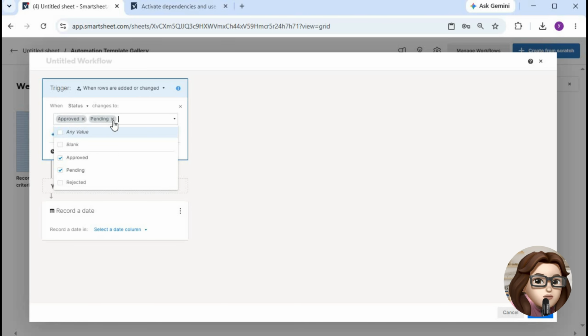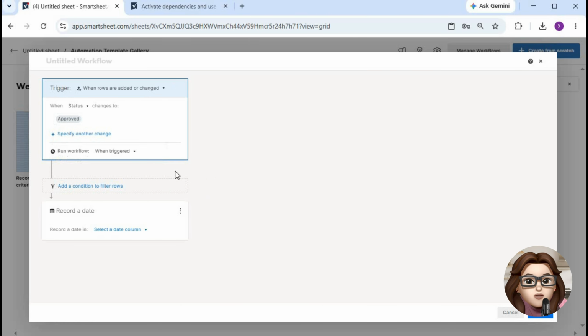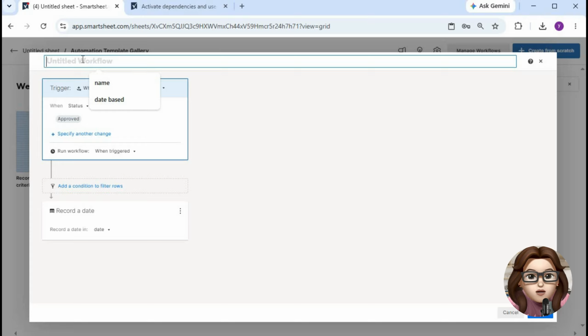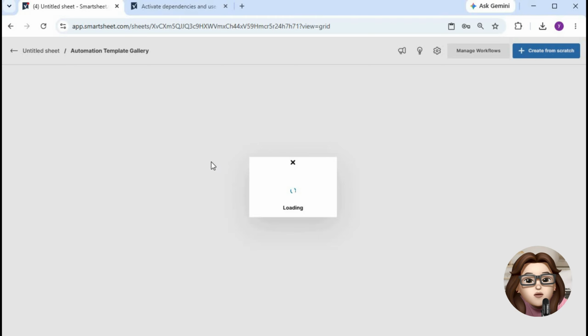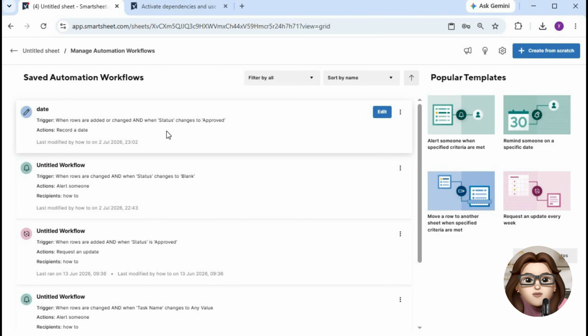You can also add additional conditions, such as setting the status to in progress when the percentage is greater than 0 or not started when it's 0. Once you've configured the workflow, review the settings and click Save to activate the automation. To test it, update the % complete value on a task and verify that the status column changes automatically.